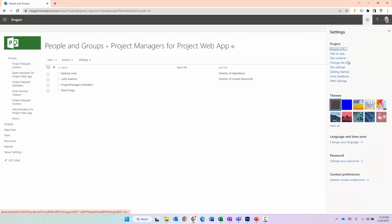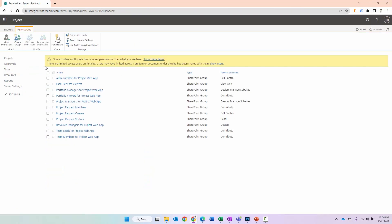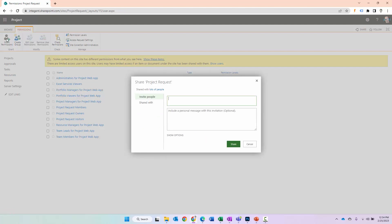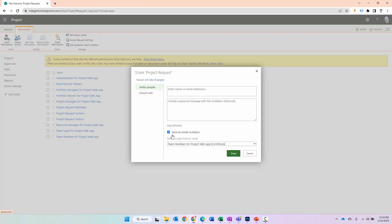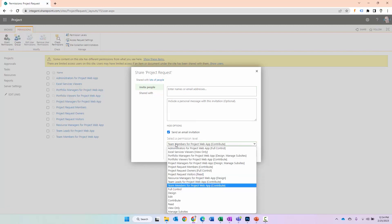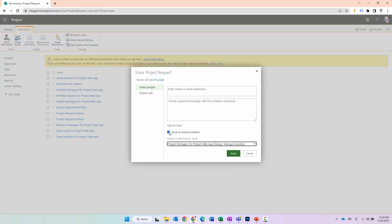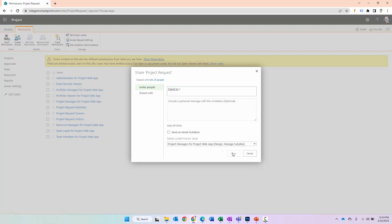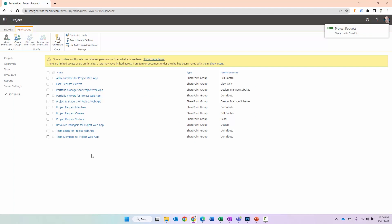Let's try that again and show a different way. Go back to Site Settings and Site Permissions. This time I'm going to click on Grant Permissions. When I click on Grant Permissions, it goes straight to the dialog. The first thing I usually do is click Show Options, because I want to select the permission level — I didn't click on the group, I clicked Grant Permissions, so I need to specify what permissions. I'm going to select Project Manager. I may or may not want to send an email. Type in David's name, click Share, and now we've gone ahead and added David — that's the second method.